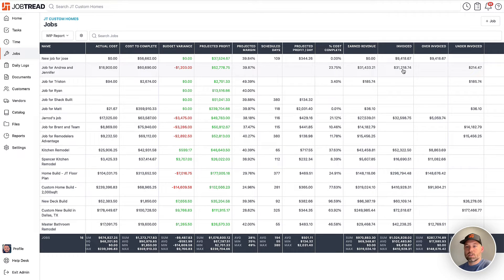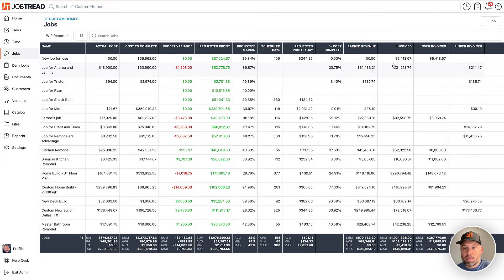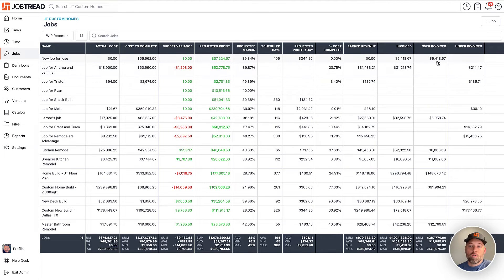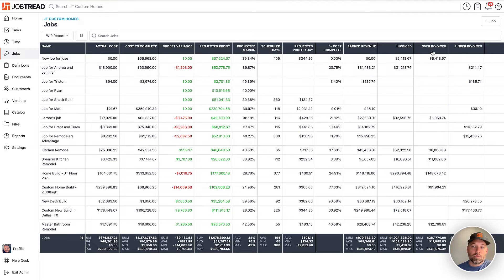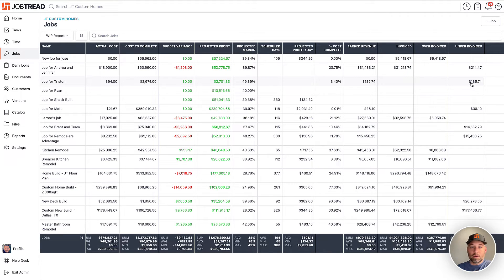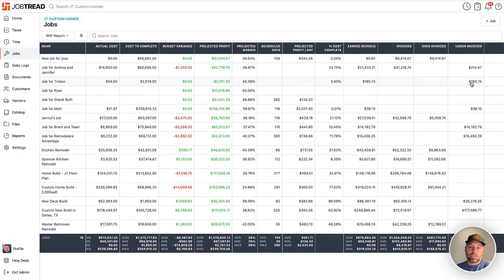So taking it just a step back, if we've invoiced more than our earned revenue, then we have over-invoiced for the job. Otherwise, we're going to under-invoice. So you're always going to be in one of these columns. Either you've over-invoiced or you've under-invoiced or you're right on par, which I imagine would be rare, or maybe at the start or end of the project, of course.